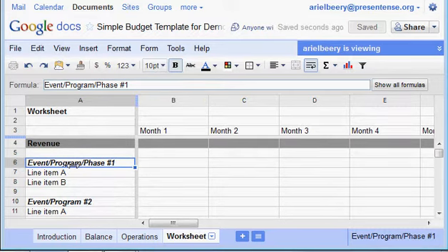So the idea is that you come to develop your budget already with a work plan. And your work plan, of course, is built into different phases. According to the work breakdown structure, you have 1, 2, 3, and 4. And under 1, you have your goal of 1, you have your activities, 1.1, 1.2, 1.3, 1.4. And under those activities, you have your tasks, 1.1.1, 1.1.2, 1.1.3, or 1.2.1, 1.2.2, and so on and so forth, right?